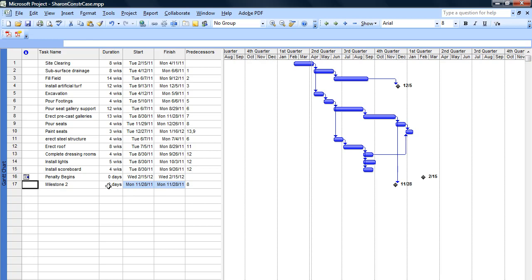Now, milestones can have a duration. Technically, they don't, but if your milestone is that you've completed a phase and you need to attain a customer approval or a customer inspection, it'll take three or four days, then you could put a milestone customer inspection and put it as three days. So you do have that option. So give that a try.